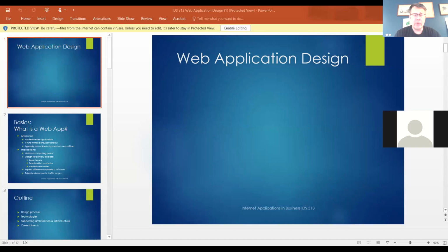So in the waterfall method, the idea is that every stage follows the preceding one. So you complete everything in one stage, and then you go on to the next one. Okay, so your basic stages: planning, figure out what your application is going to do; coding, actually writing the application; testing it, making sure that everything works correctly; releasing it to the outside world, right? You say, okay, here it's finalized, go ahead and use it, we think it's good. And then maintenance, periodic updates, correction of defects, that sort of thing.